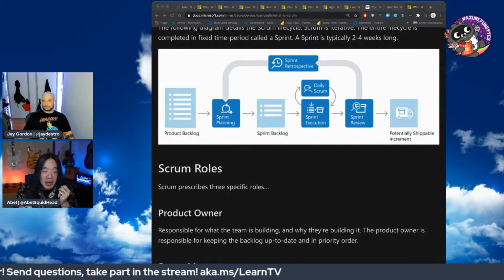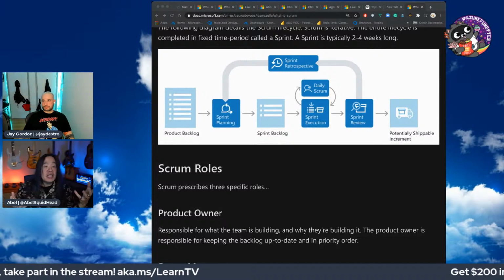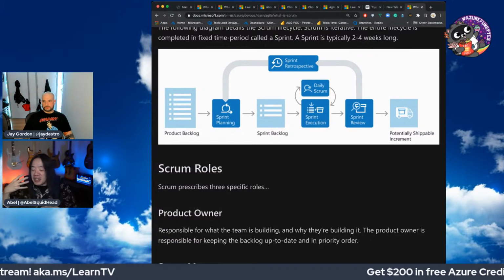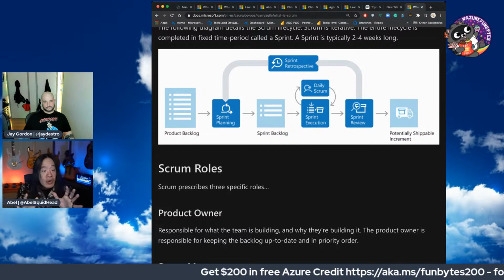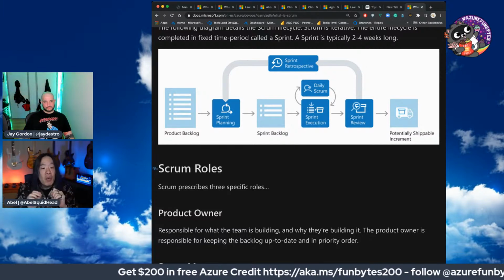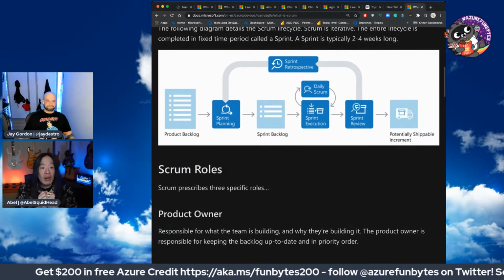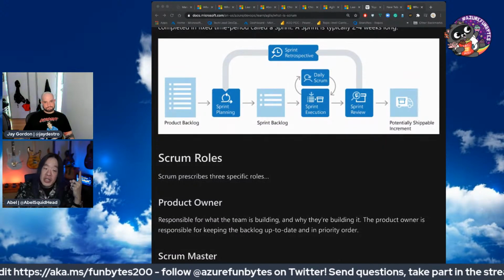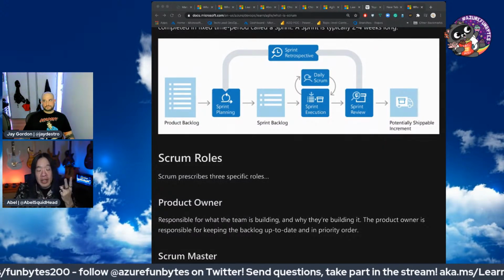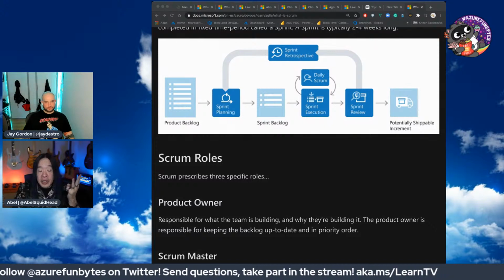And that's it. Right? A lot of people are like, oh, a daily stand-up, then we should go into depth and talk about things really a lot and blah, blah, blah. No. A daily stand-up should never be more than 15 minutes. If you have an hour-long daily stand-up, guess what? You're doing it wrong. It's just three things. This is what I did yesterday. This is what I plan on working today. And if I have blockers, these are my blockers.